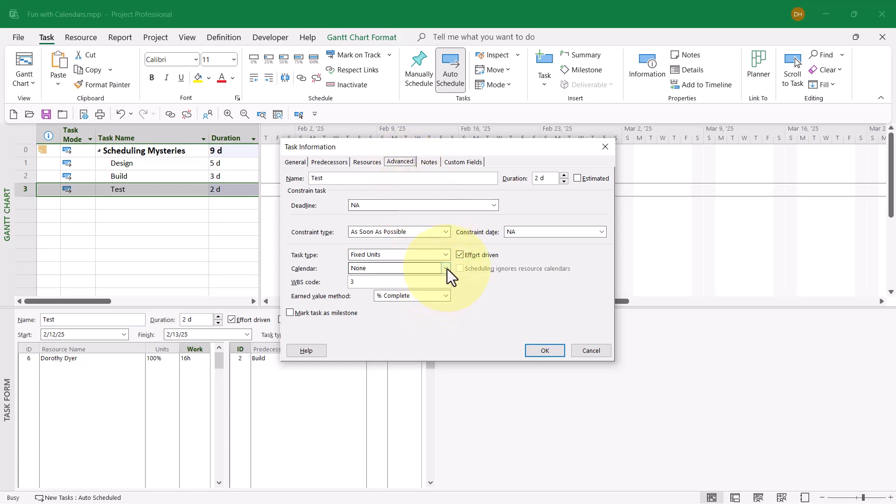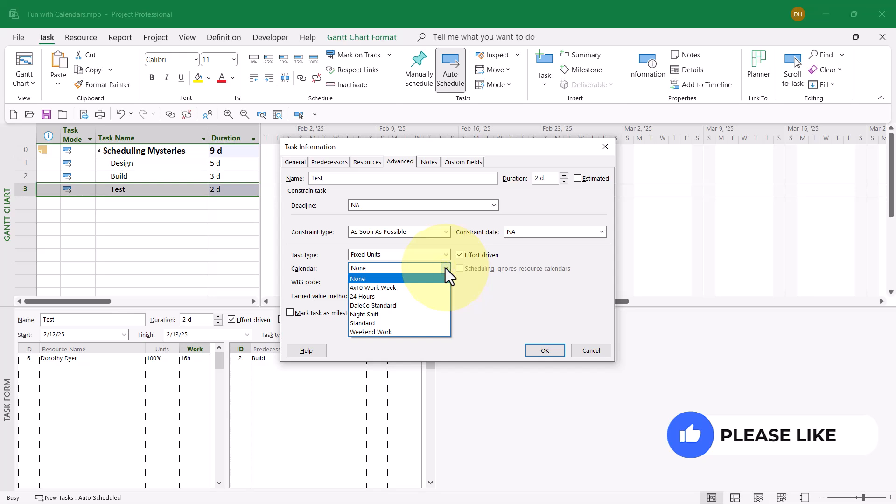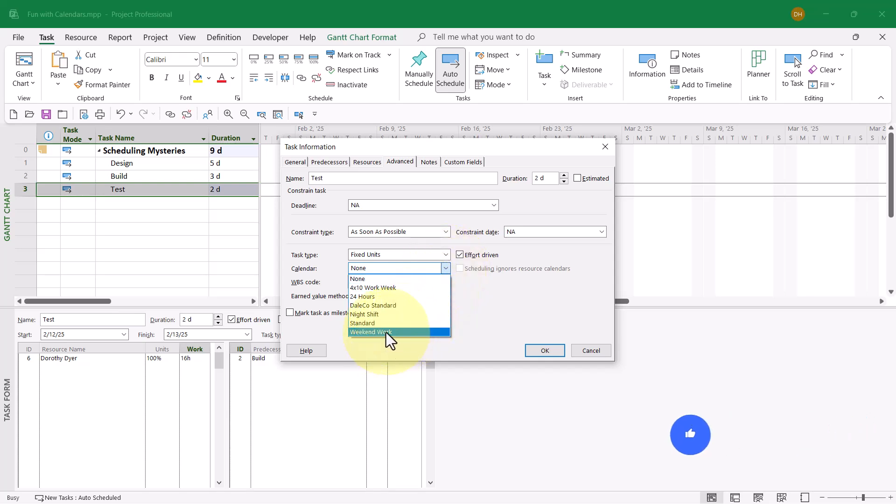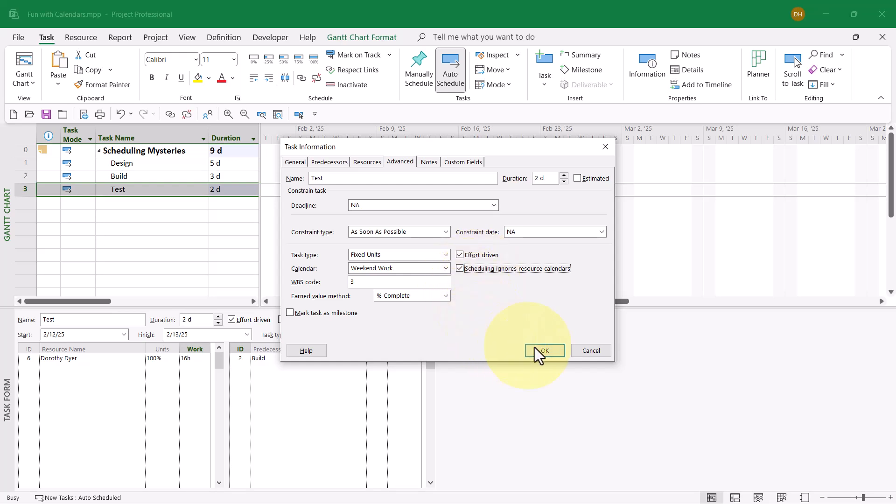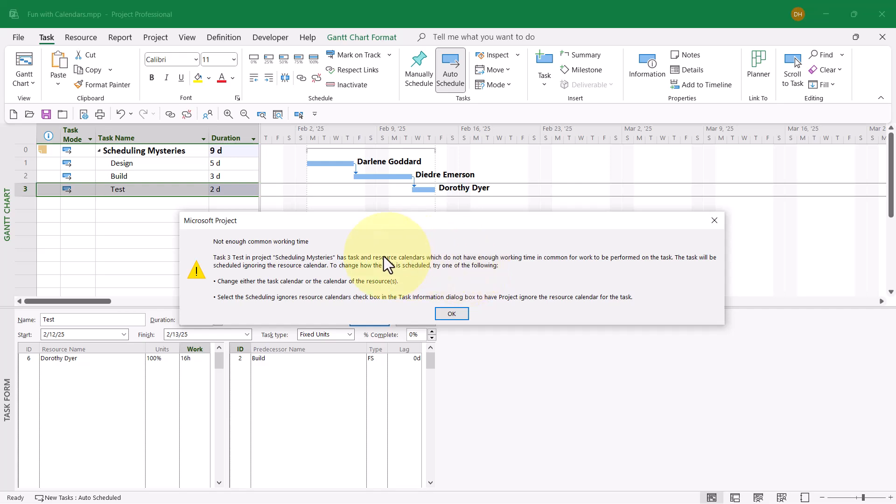Down near the bottom, the calendar pick list. This refers to an override calendar, a task calendar. I'll change the value from None to Weekend Work, and I'll also select the checkbox Scheduling Ignores Resource Calendars. That'll force the resource to work during a weekend when they don't normally work a weekend. When I click OK, we get a warning dialog telling me we're assigning the resource to work on a weekend. That's fine. Just click OK.